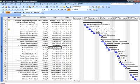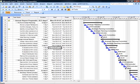Why do you need to save a baseline? Once my raw plan is ready and I'm all set to kick it off, at a later stage I should know what was planned and what is current. If I want to know the variance between planned and actual, it is very important to save a baseline.